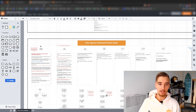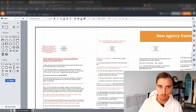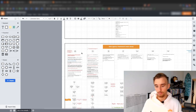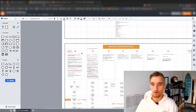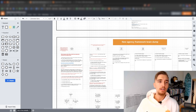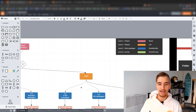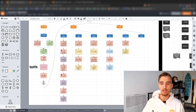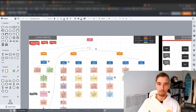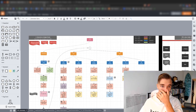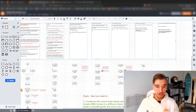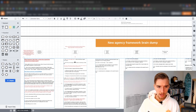In this process I also put in the work packages. This is level three — work packages — and this is the level I like to start with when building an entire digital brain or agency framework. First define the work packages, because deciding the phases you go through can happen after you get the work packages done. But first you need to get the work packages and activities broken out. Then you can decide how to chop up the phases, and then the project takes about 10 seconds to make. So I brain dumped it, then once I had it in text format in a decent order with a good structure — VA, do this, 1.1, 2, 2.1, 2.2, 2.3, etc. — then I broke it out into a flowchart format.